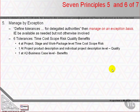PRINCE2 divides management control into four or five levels of authority. At the top is corporate or program management, who delegate project tolerances to the project board. Next, the project board directs the project and delegates stage tolerances to the project manager. Third, the project manager managing a stage delegates work package tolerance to the team members or team managers delivering a work package's product-based results.